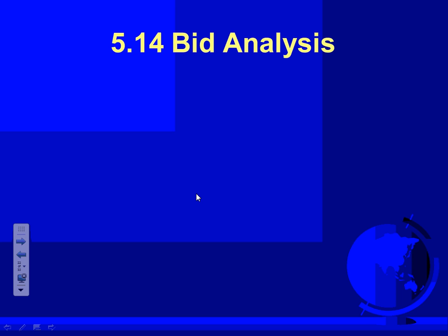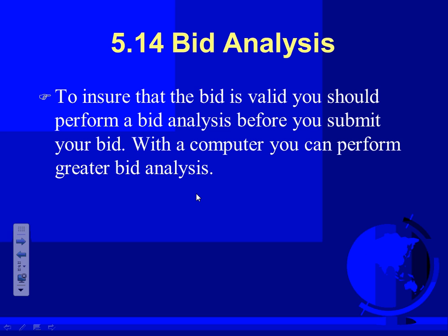Bid analysis will make sure that you look at the whole overall bid and compare it to historic data. So are you within the allocated values per square foot or not? So the bid is valid, so you have to compare it with historic data. For example, if you remember when we were at Parsons, they told you that you have to find the percentage of your labor from the overall bid price, material, switch gear, major things, guys.